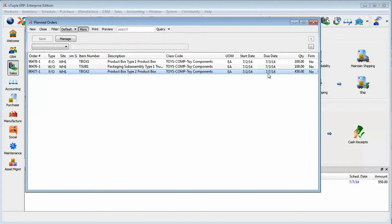Now, if you look at the calendar, today is a Wednesday and the 7th is, I believe, is a Monday. So what it's doing is because we are using the shop calendar, Saturday and Sunday are closed days. So effectively my lead time of three days is three working days.